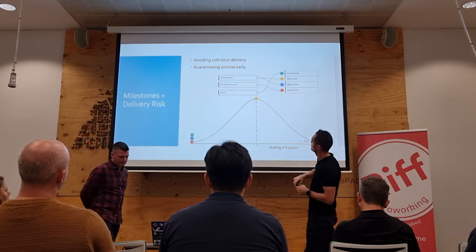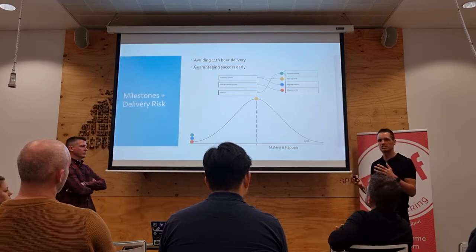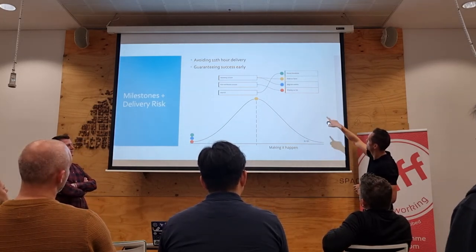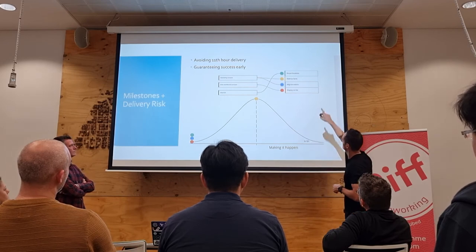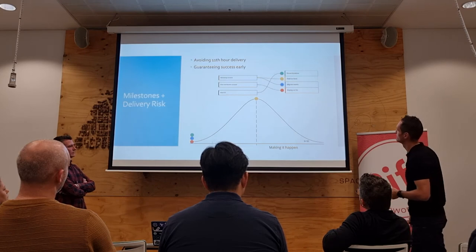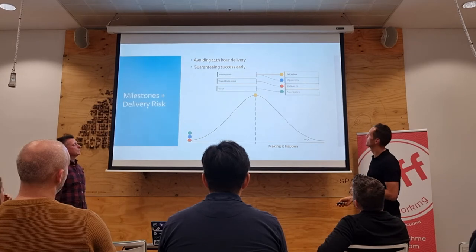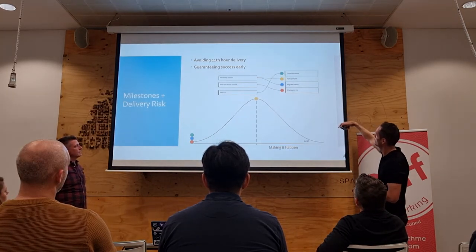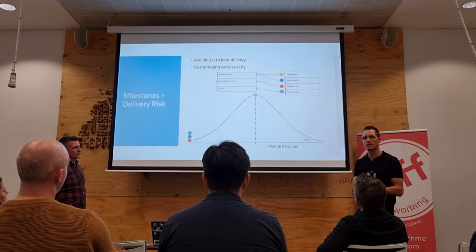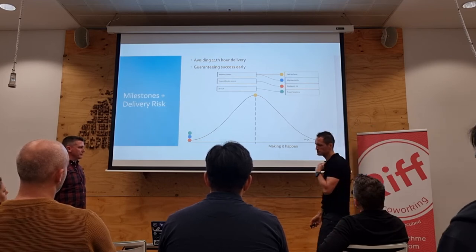We allowed ourselves to group those together, and sometimes you might have one scope that ties into a milestone. Generally, it's more than one. But here we can see that form on field micro event drives into marketing consent, but preset locations is first. This sort of visually tells me something's not quite right here. So very quickly, I can say, well, hang on, shouldn't they be around the other way? Preset locations just gives us a really nice experience, but that's not the key thing that's going to drive the business. That's the upgrade. So we move these things around.